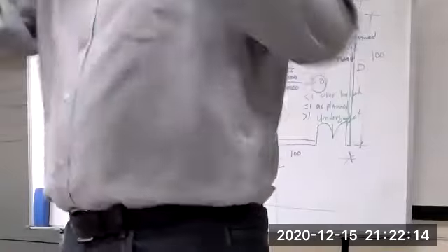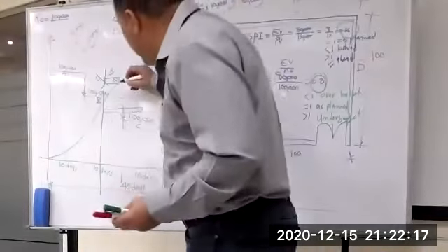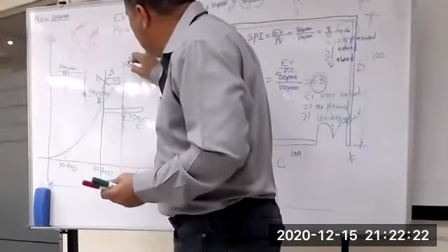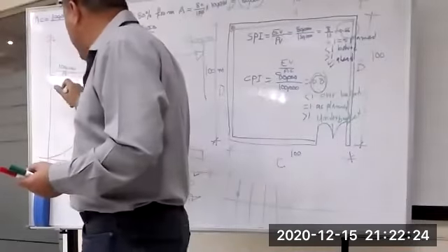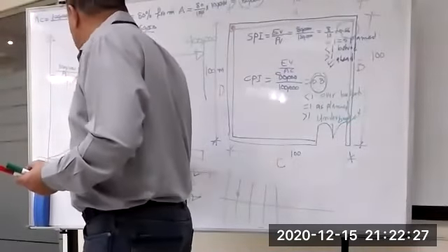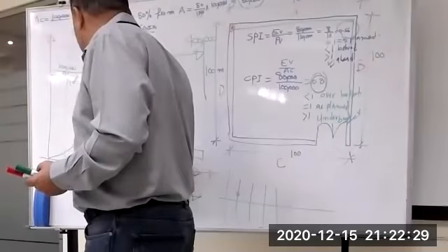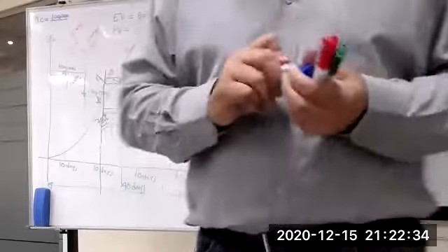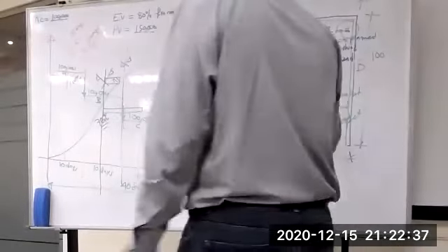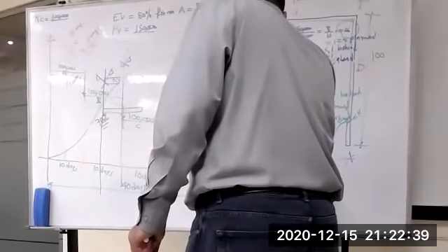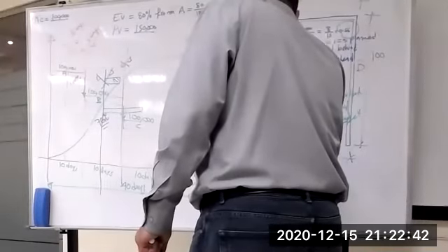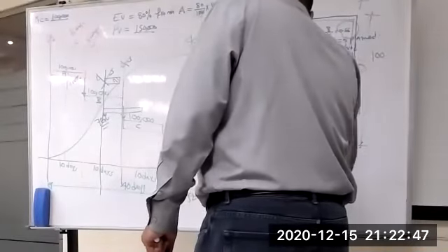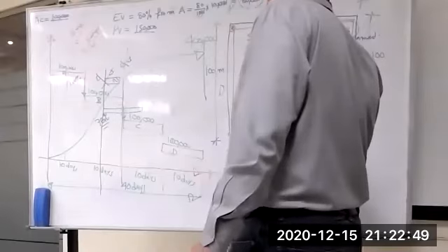What is the impact? Ya ammi, he came in this day. What has been done? Activity A is actually 100% done, and 75% from activity B is done. What is the added value now? The added value now is what? Second case, and the added value is equal to 100,000 plus 75,000, divided by 200,000.